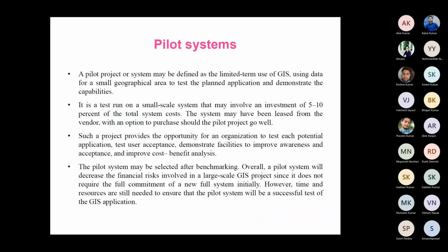Such a project provides the opportunity for an organization to test each potential application, test user acceptance, demonstrate facilities to improve awareness and acceptance, and improve cost-benefit analysis. The pilot system may be selected after benchmarking. A pilot system will decrease the financial risk involved in a large-scale GIS project since it does not require the full commitment of a new full system initially. However, time and resources are still needed to ensure that the pilot system will be a successful test of the GIS application.